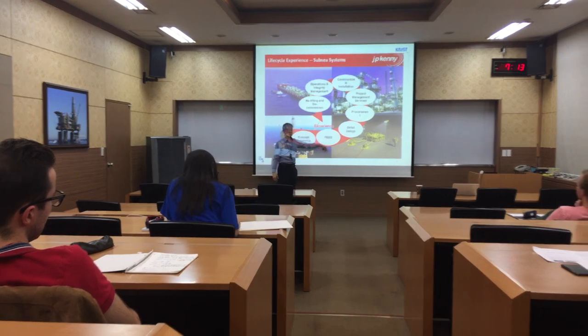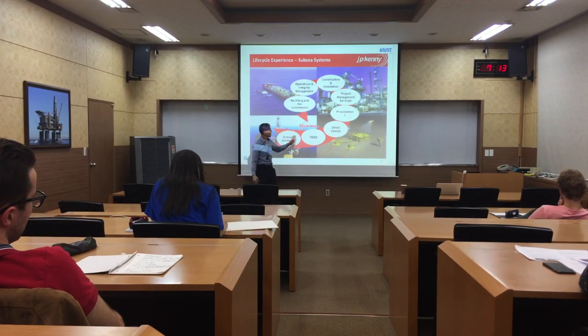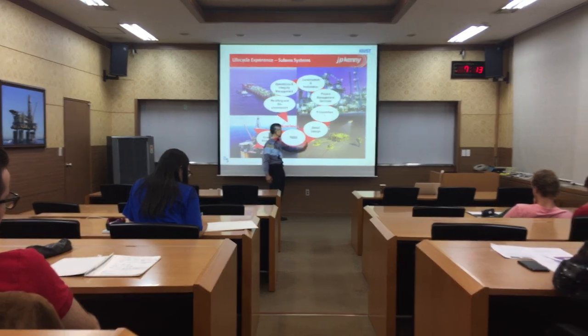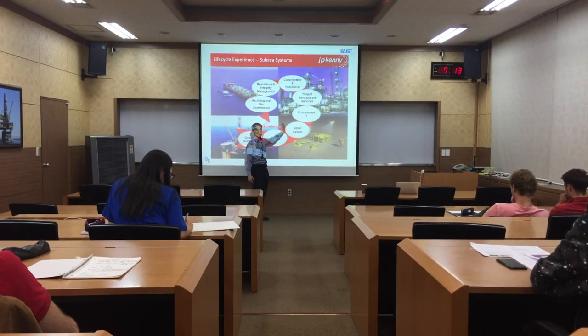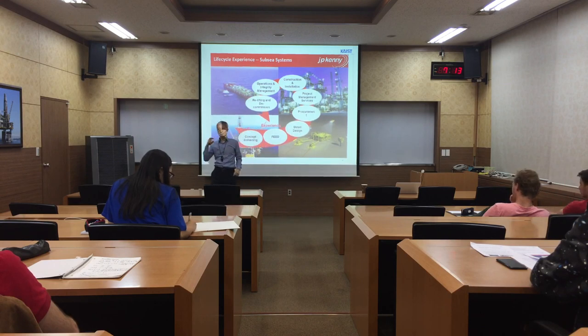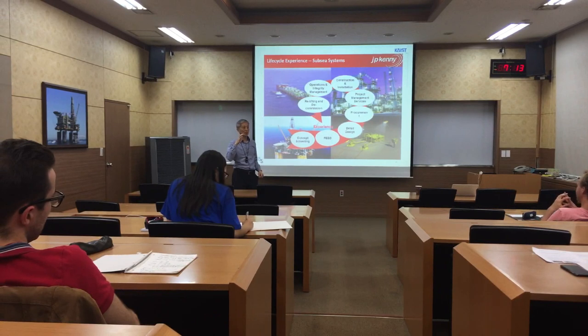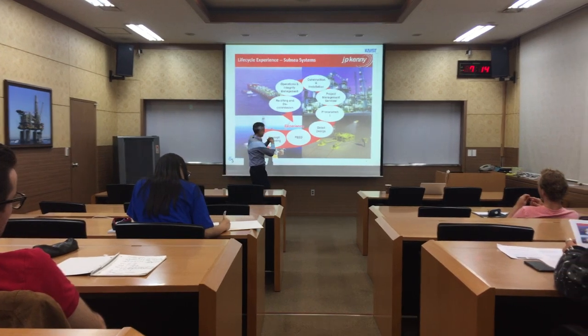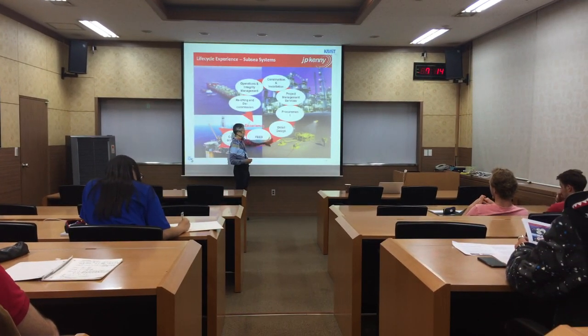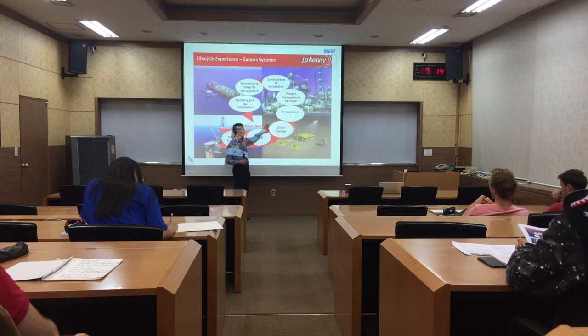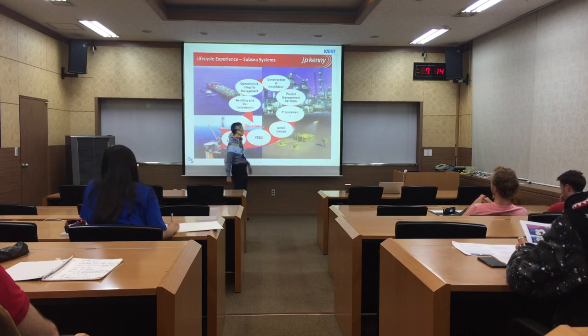FEED is front-end engineering and design. That is just before the contract. So the contract should be somewhere here. The contract, say for the ocean plant, is usually between an oil major, Shell or BP, and a shipbuilding company such as Samsung Heavy, for construction. So there is a contract here.